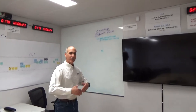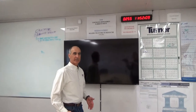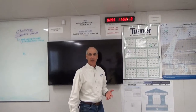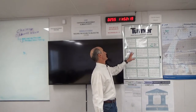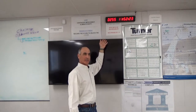We utilize the whiteboard also to do a plus delta at the end of every single meeting, whether it's with the subs, the owners, the OAC, or our internal staff meetings. Because working for Turner, as we all know, every meeting starts with safety, and now in the last planner world, every meeting ends with plus delta. So it starts and finishes every meeting the same way.